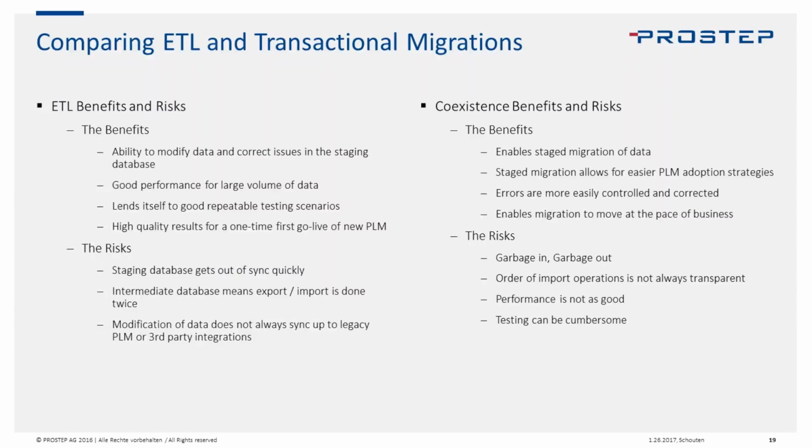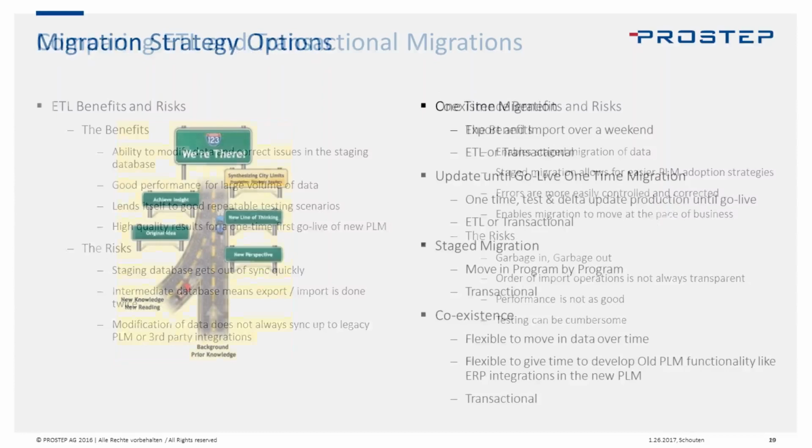Obviously, the performance is not over a weekend. It's typically done slower, and it needs to be tested and retested when there's a new version of your new PLM system, or there's issues that come out, or the old PLM system gets updated, or you have a new type of CAD or something like that. Definitely you need a lot more testing, and it needs to be ongoing, whereas an ETL is really just a 100% data migration rehearsal.